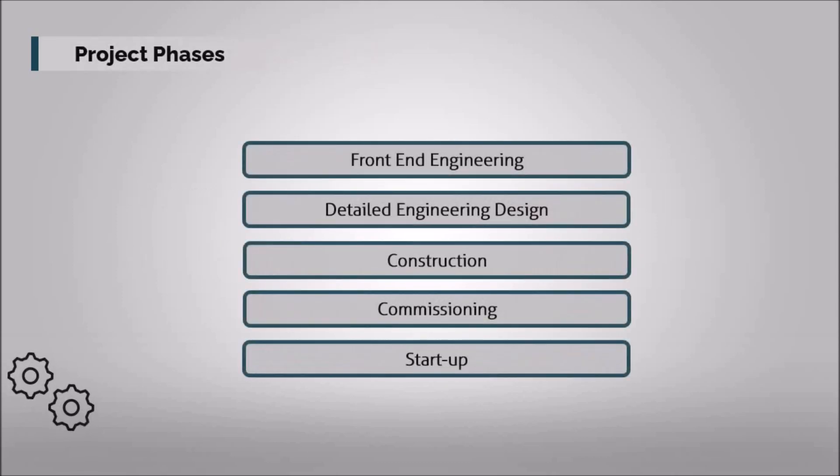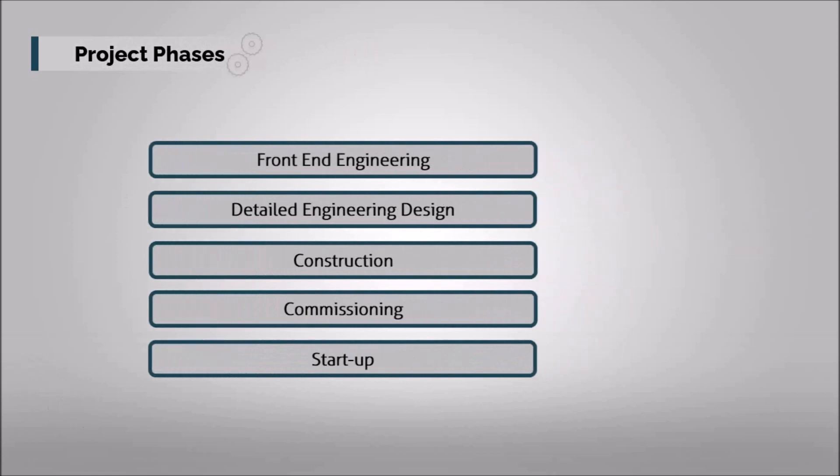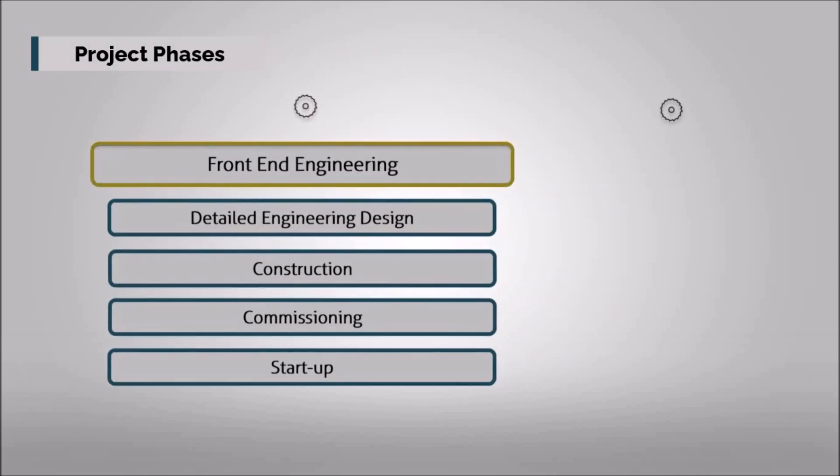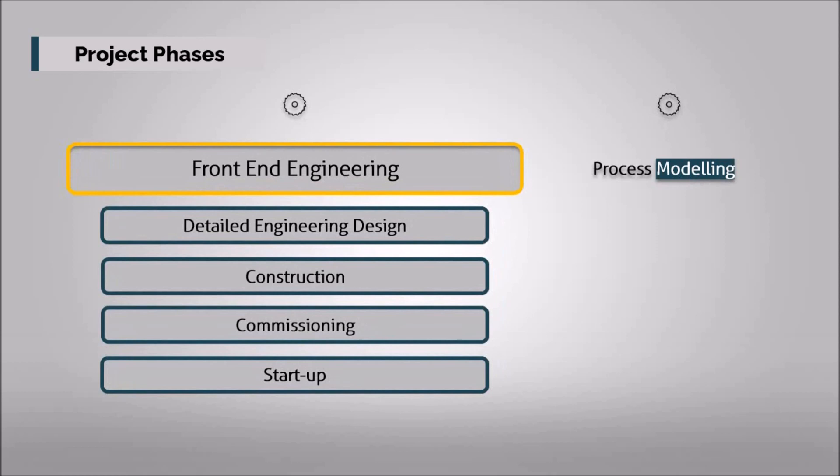The chemical engineering projects are developed by following some phases. It starts with front-end engineering design, which is the stage of development of process modeling drawings, such as block flow and process flow diagrams in simulators and initial estimation of construction cost.